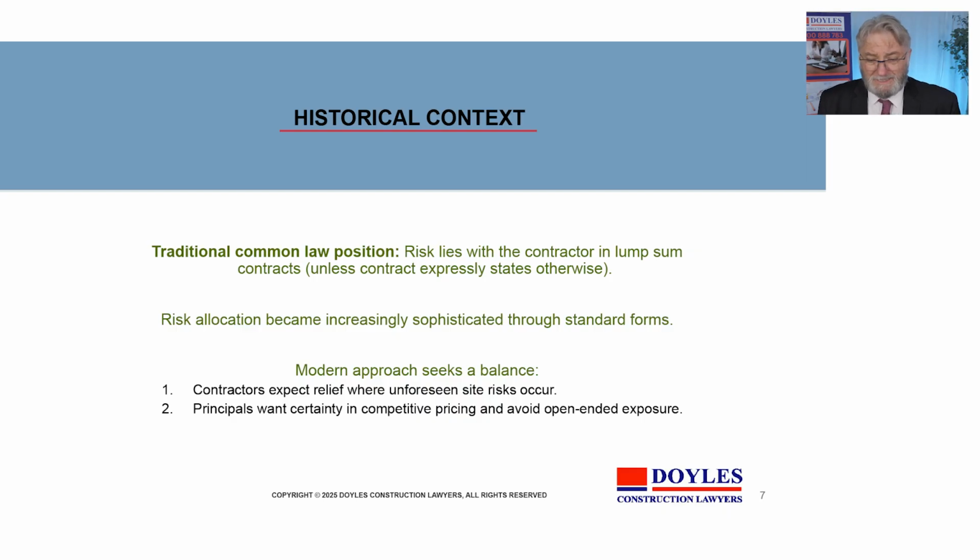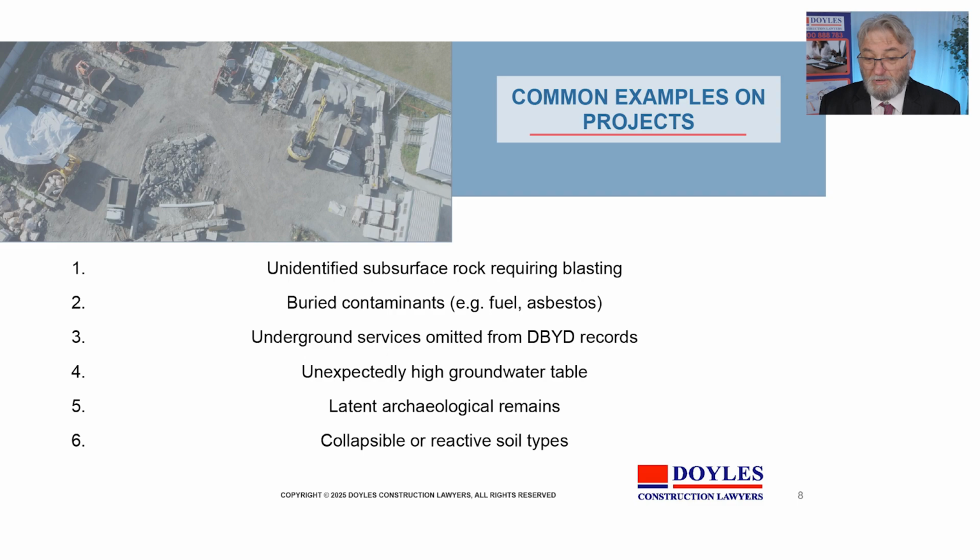So the modern contract tries to seek that balance, but in recent times there have been projects which we've seen around recently where the principal has put all of the risk on the contractor, and at an onerous level where the contractor is expected to experience all of the risks of looking at the land, understanding the history of the land, understanding the previous excavation or construction on the land, and taking open-ended risk. Additionally, in some of the more onerous contracts, they're backed up with an indemnity clause. Contractors have to be aware of it. If you get caught, it'll be difficult.